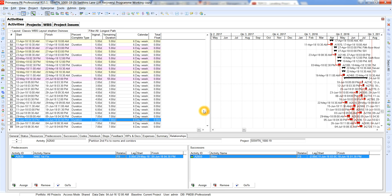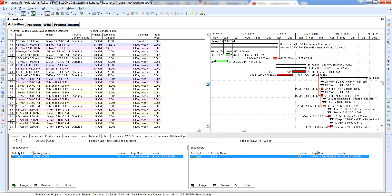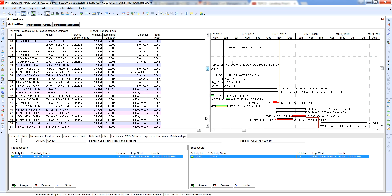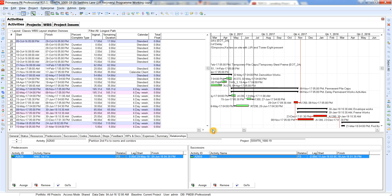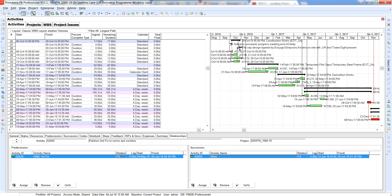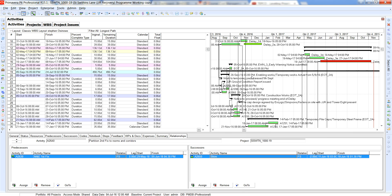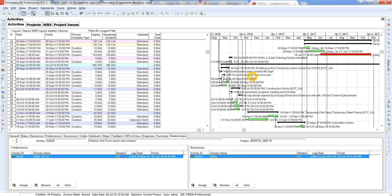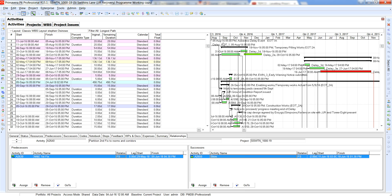So there we have it. So even looking at this we have some non critical activities on the longest path. This is the best way to actually analyze because the longest path gives you the longest duration all the way to the end of the project. So if you were to basically recover the project you would have to look at all of these values. As you can tell, if you had this out this literally tells you a lot more about your true critical path.